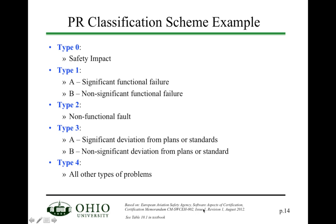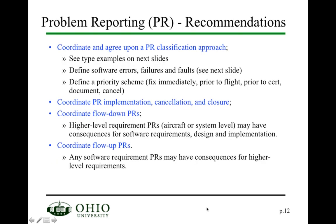It's a memorandum and it's available on Blackboard. Besides defining errors, failures, and a set of types based on these definitions, you need to define a priority scheme — to say this needs to be fixed immediately, whether it needs to be fixed prior to flight or prior to certification, or whether we need to cancel it.